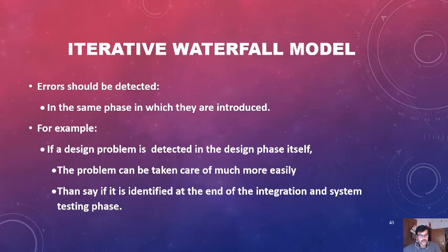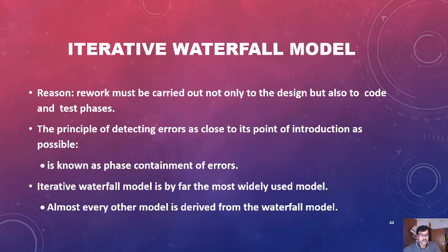If you find the problem in integration and system testing, the software has already been prepared. If you find it in the design phase, the problem has not yet been carried into coding or any other process. So detecting defects in the early stages is more helpful and easier to rectify.